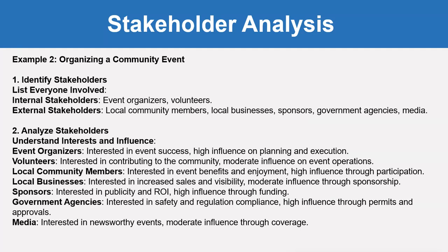Local businesses are interested in increased sales and visibility, with moderate influence through sponsorship. Sponsors are interested in publicity and ROI, with high influence through funding. Government agencies are interested in safety and regulation compliance, with high influence through permits and approvals. Media are interested in newsworthy events, with moderate influence through coverage.